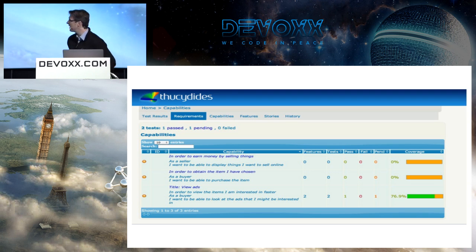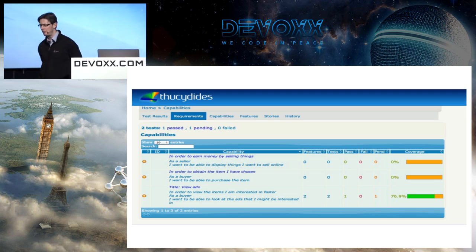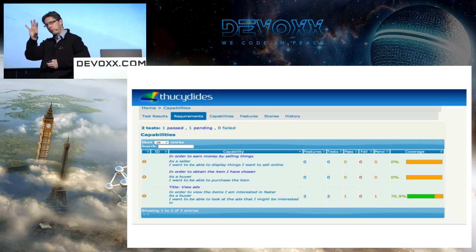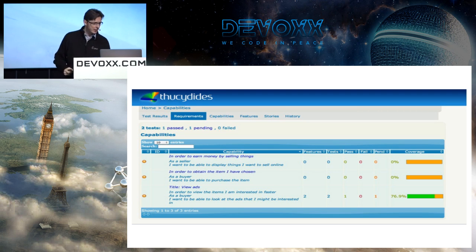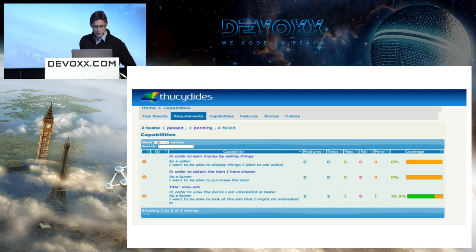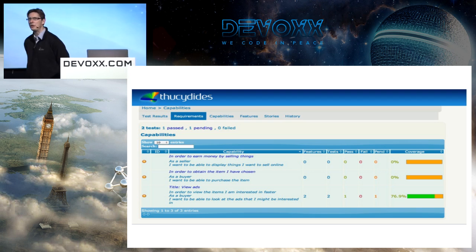So here's another interesting aspect of it, which you don't see in pure JBehave or EasyB or Cucumber or any reports of that nature. Now remember, we are talking about having our capabilities, our features, our stories, our scenarios. You want that hierarchy to be reflected in your reports. So you want to be able to see how many features have actually been delivered for a particular capability, and also how many have been specified but haven't got any tests. So this is not a test report, this is a requirements coverage report. So we've got here a capability up here, the first one, in order to earn money by selling things. We've got 0 coverage, nothing's been done. So there may be tests that are pending, or there may be no tests at all.